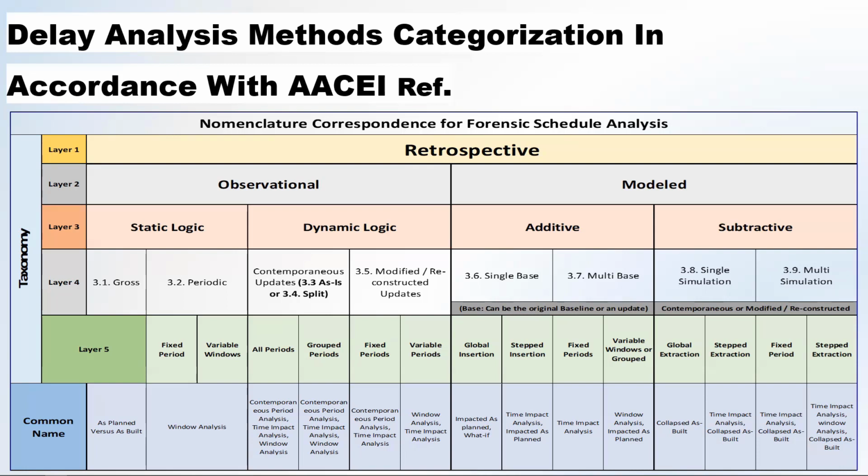For example, if the estimated duration is 10 days for excavation and it took 20 days, I'm going to put an activity of 20 days, and after this activity, the sequence will be that I find a groundwater table milestone on the actual date, and then I do dewatering for another 10 days, and I do an inspection for 1 day, and then I start soil replacement for 30 days.